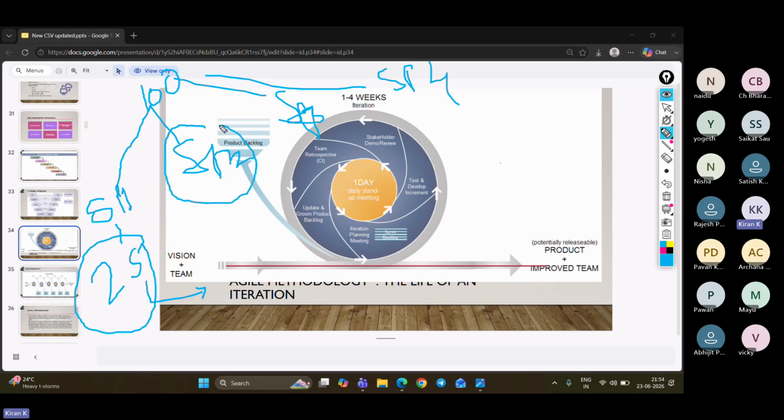And then secondly, we will be gathering the feedback simultaneously. SP2 is going to be developed by the developers. For these 25 requirements, customer feedback will be gathered and the performance will be monitored for the systems. If anything needs to be addressed, that also we will be clubbing into sprint 2. Any bugs, issues, feedback, or performance issues, we can incorporate in sprint 2, or we can park them. But for now, we have released the software.